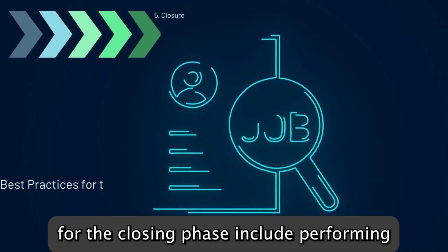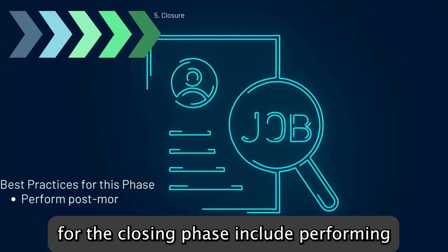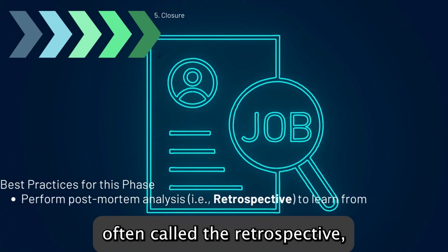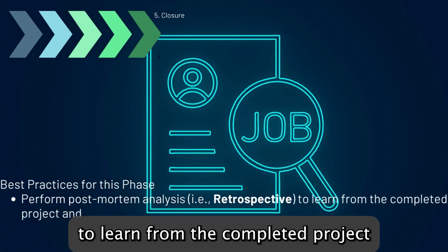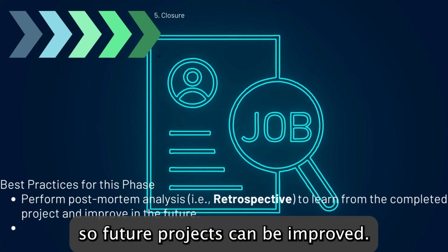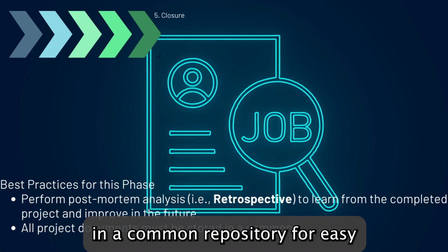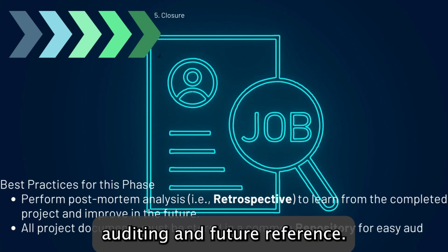Best practices for the closing phase include performing a postmortem analysis, often called a retrospective, to learn from the completed project so future projects can be improved. All project documents must be stored in a common repository for easy auditing and future reference.